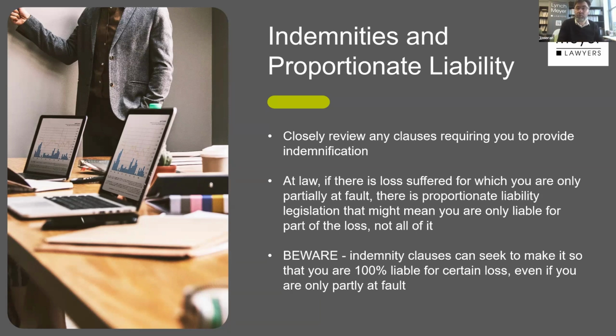But if you've got an indemnity clause that says that you indemnify the party that engaged you for any problem that's caused or contributed to by your act or omission, then under the indemnity clause, you will be liable for 100% of the loss, even if you're only, say, 10% at fault. Now, this is part of the game of contractual drafting, is that the party engaging you, they want to lock in everyone to be 100% liable for the loss.